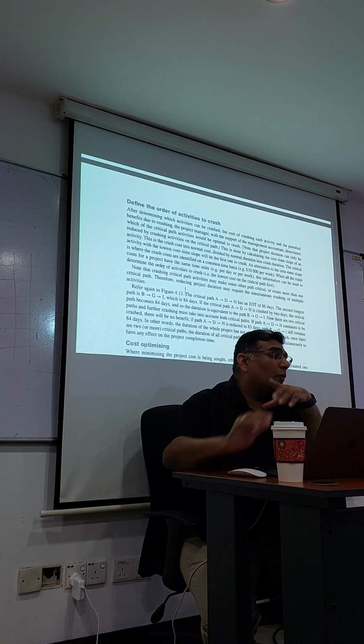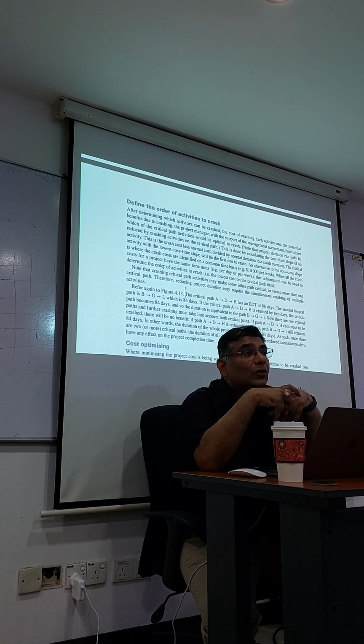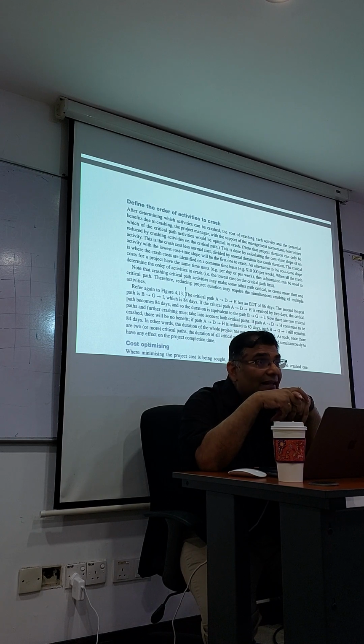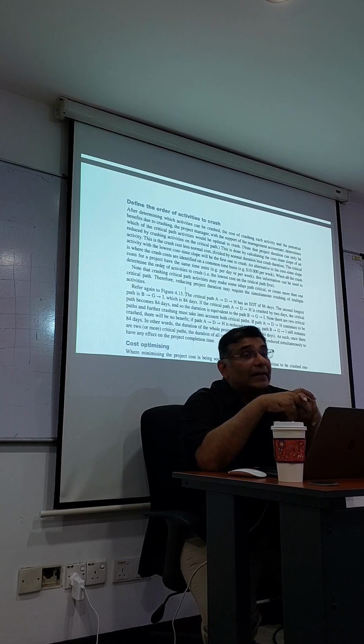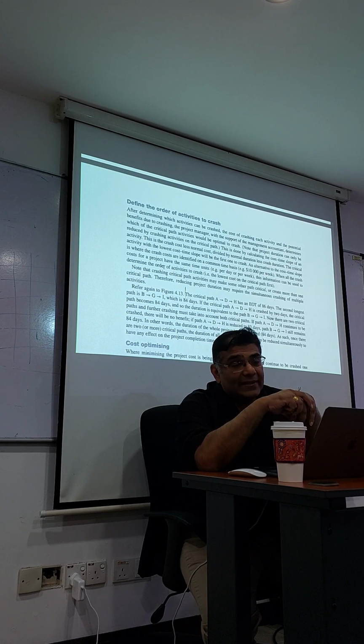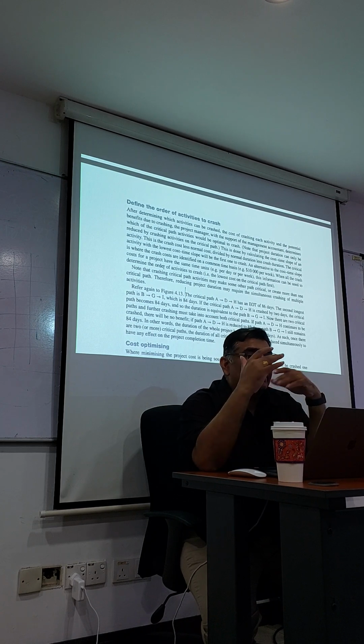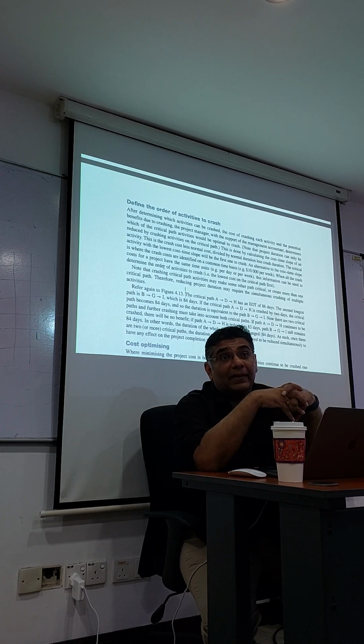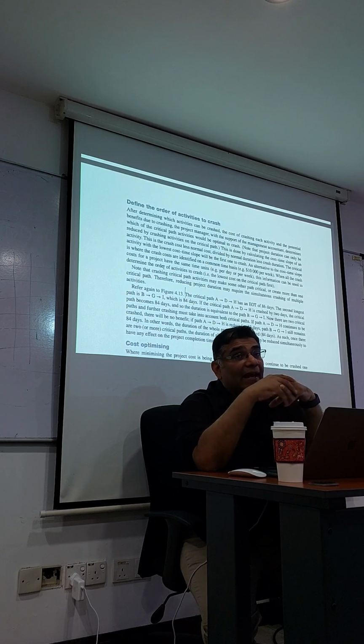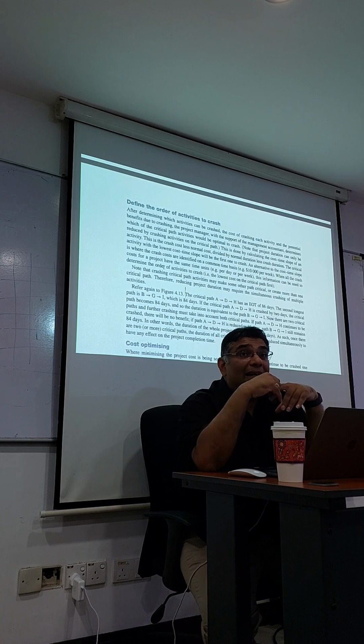You also have to know which one to crash first. You always crash activities inside the critical path analysis. Remember this rule: you always crash activities inside the critical path analysis until it becomes matched with the other critical path. You always crash everything in the critical path analysis until it matches the other line.